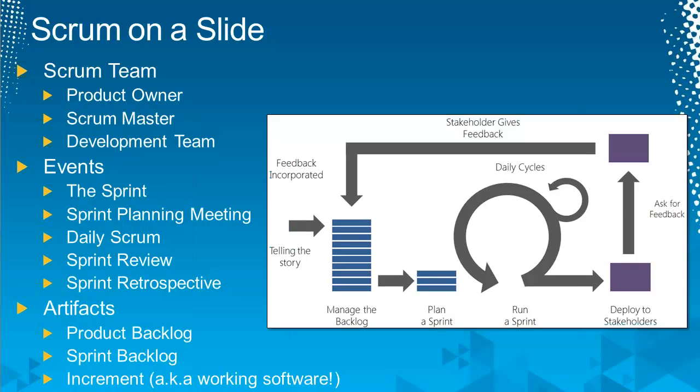When the sprint is winding down, hopefully the product owner has been involved and is seeing the increment of software being developed, likes what he or she is seeing, acceptance criteria is being met, the definition of done is being met, and it's actually demonstrated at a sprint review meeting. Stakeholders are invited, feedback is given, the increment is accepted or it's rejected, and the team celebrates that at a sprint retrospective or learns from their mistakes at a sprint retrospective.